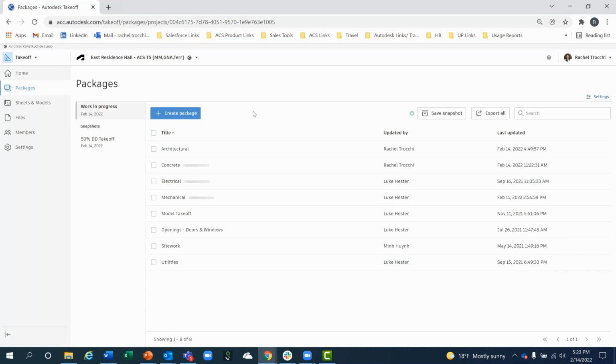throughout that full project. And then within your work in progress tab, you can always jump into any of those new updated drawings, pull those previous takeoffs forward into the next design iteration, and then continue that takeoff process and make those adjustments there. And of course, you can add in as many different snapshots in here as you want to really continue to track that full estimate throughout that project lifecycle.